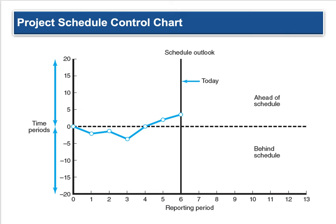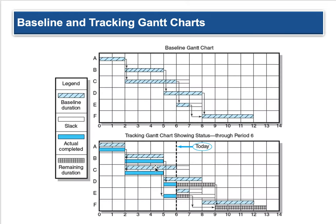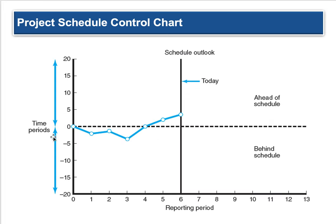A control chart is something we haven't spent a ton of time on, as I lean toward the Gantt, and the industry does too. On a control chart, you have time periods on the horizontal axis and a baseline dotted line. Anything below the baseline means you're running behind; anything above means you're running ahead. At one point — say stage four — you're right on time after running behind through the first few stages. Now you're running slightly ahead, which is great. The line is the plan, so you're running slightly ahead of schedule after having struggled right out of the gate.